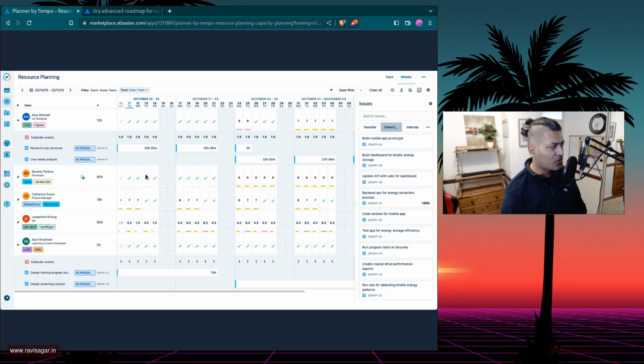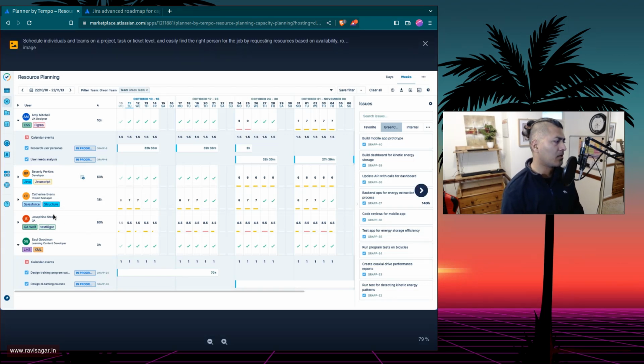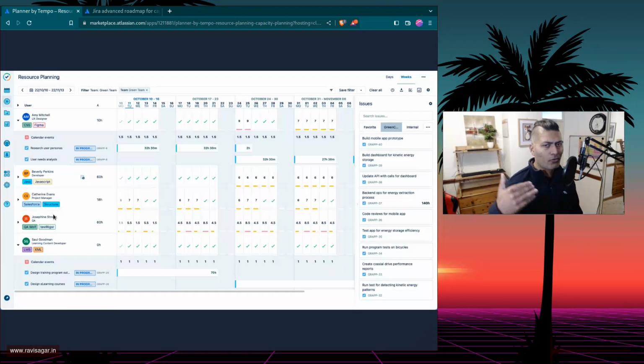And you can also do this at the project level. So you have a view which you can maintain, use, track and report on within Jira. You can say that this resource is working on this activity or this project for the next 3 months, maybe full time or maybe half of their time. This is really useful because it lets you store this information within Jira and take decisions. Then when it comes to actually planning the work, when you get into the details and proper tracking, when the project kicks off, you can use this information and plan the work, picking up the resources from your pool where you have stored this capacity information.